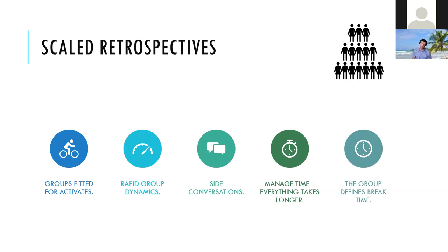Oh, and of course, if it's a scaled retrospective, then everything is totally different. Maybe the scaled retrospective is important when you're making a retro for 80 people. And the question is, how do you deal with it? Are you doing it alone, or do you have people who can help you? Because if you're doing it alone, you need to divide those 80 people into groups of maximum 7 to 9 people. But if everything is happening in one place and you have helpers, you need just the introduction, an explanation of the situation, and the group dynamics of the audience.